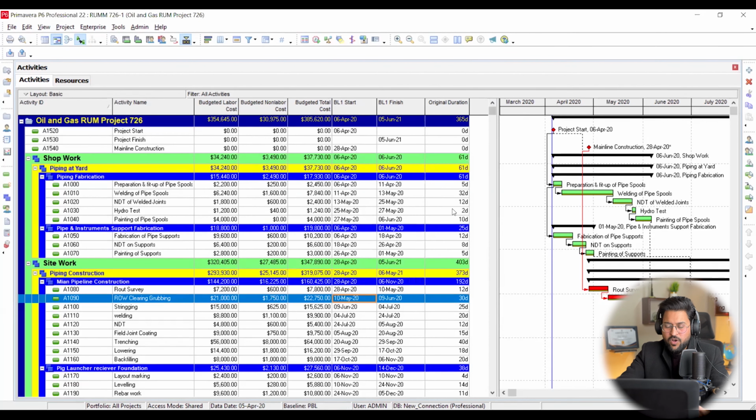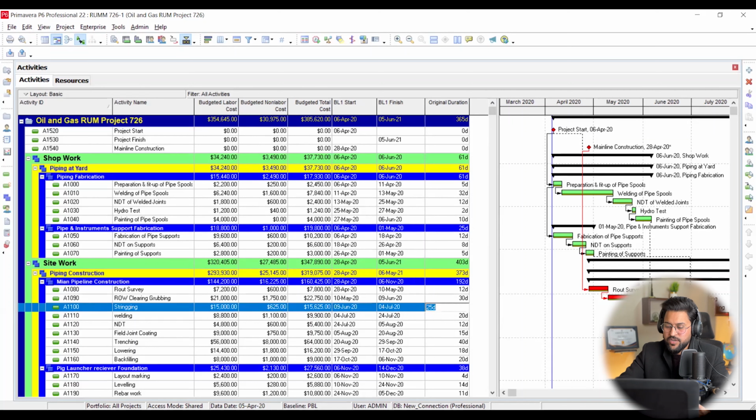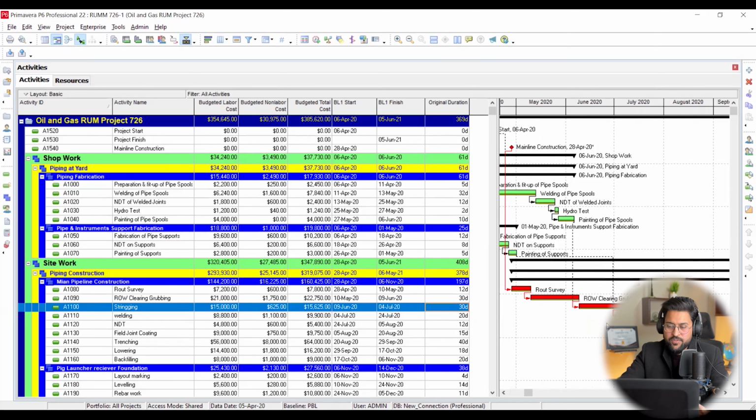Okay. And now I'm going to tell you, if you are going to change anything, like if you are going to change here 30, 25, something like that, you can see what's going to happen. See, it's going to change each and everything. It is going to tell you. So the bars underneath this red color line are showing baseline. The bars which are above this baseline are tracking, the execution phase oriented works. So you can see how it is showing your dynamic change.